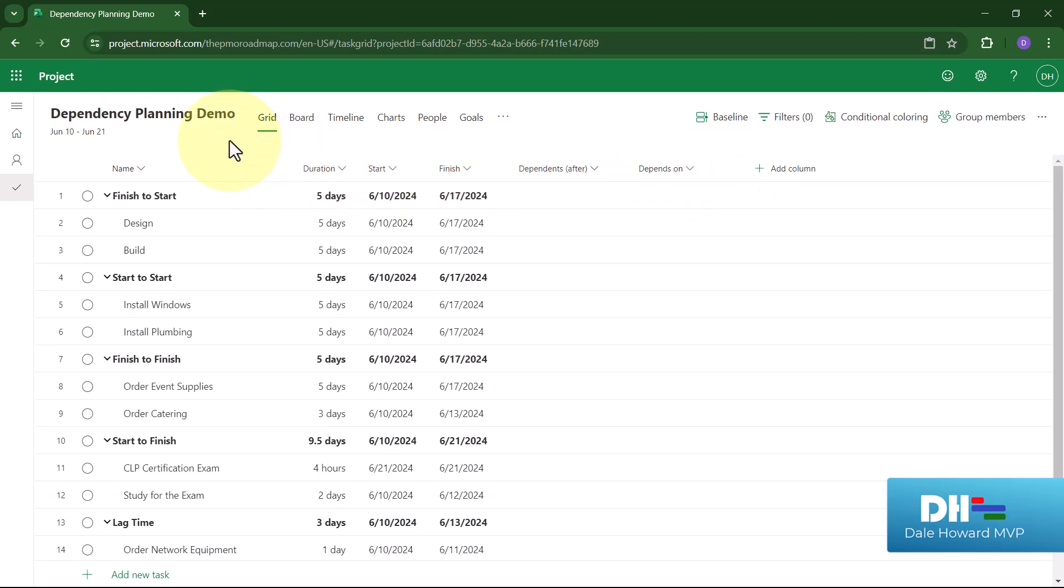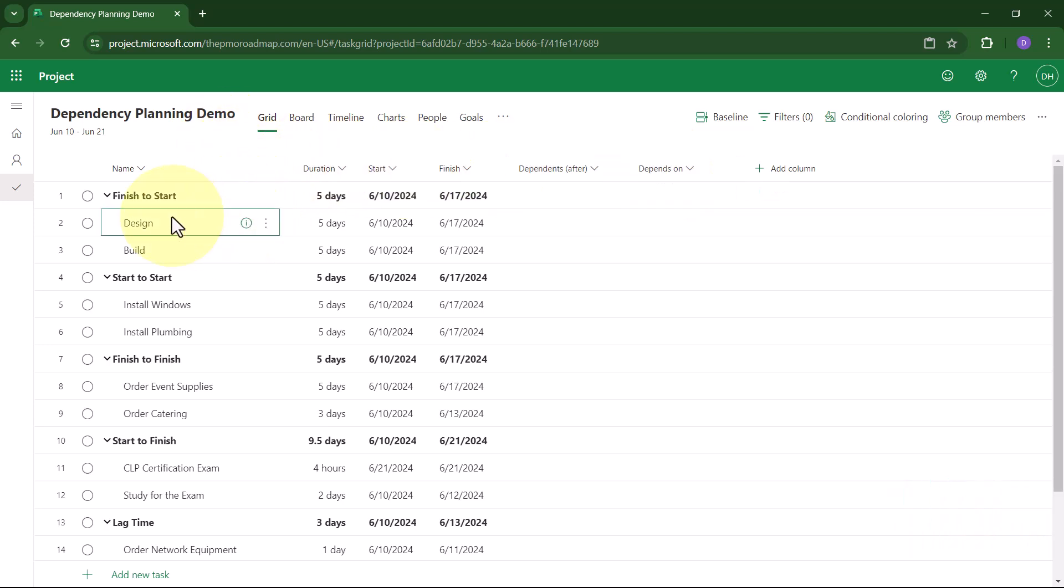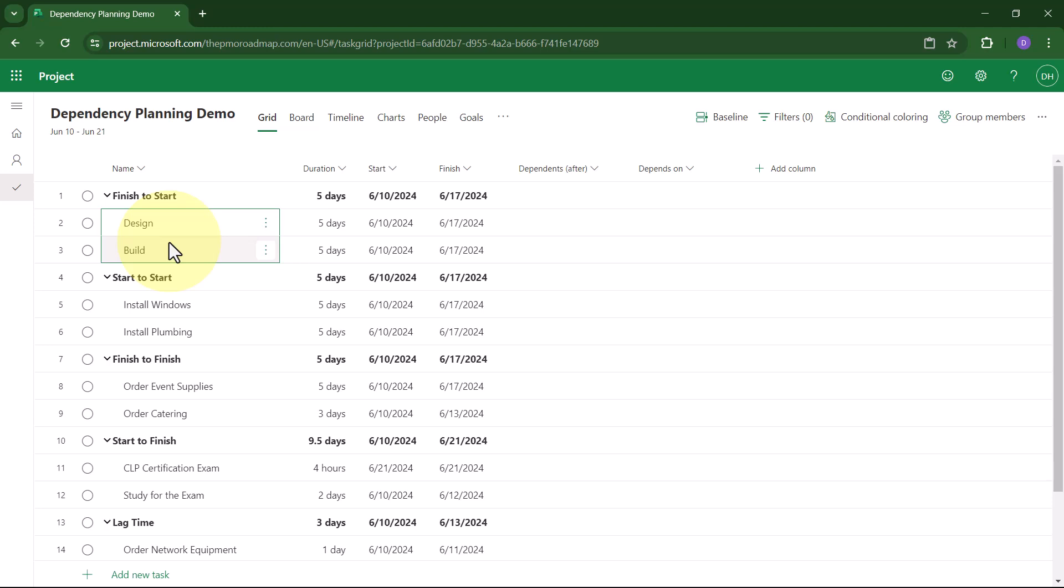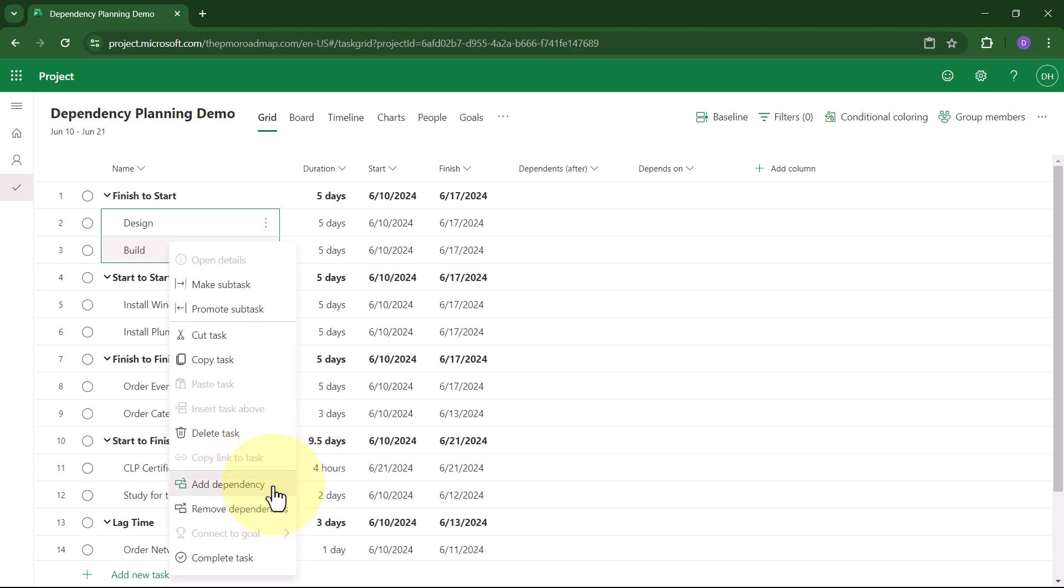So how do you use each of these dependency types? Finish-to-start is the easiest to set. All you need to do is select the tasks that you want to link, then right-click anywhere on the selected task list and choose the item on the shortcut menu called Add Dependency. Project for the Web will automatically create a finish-to-start dependency.